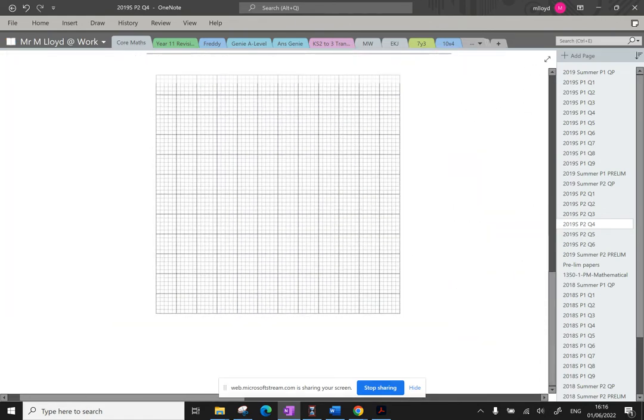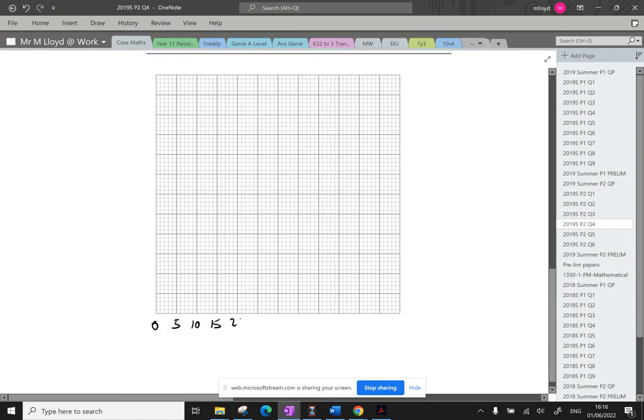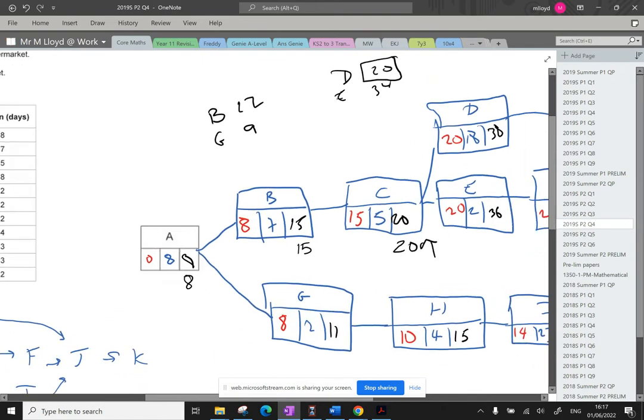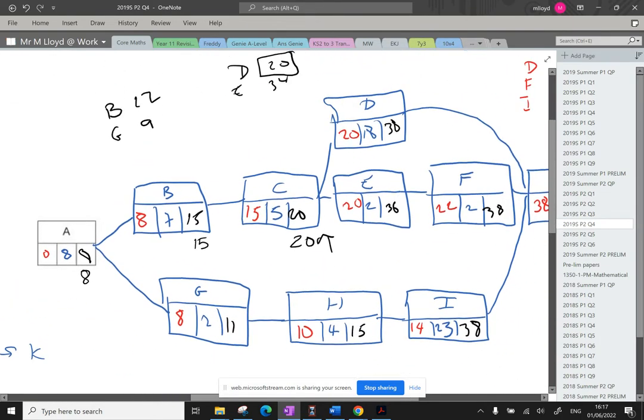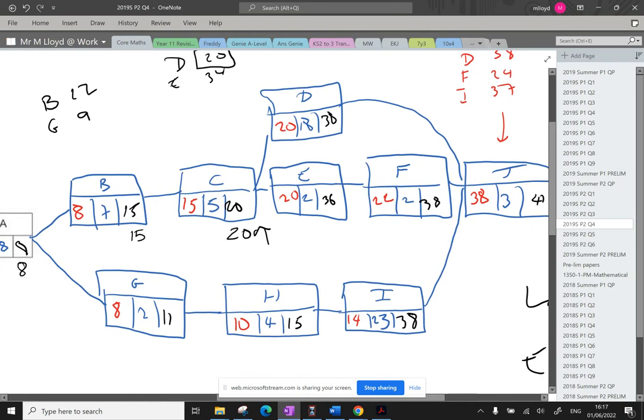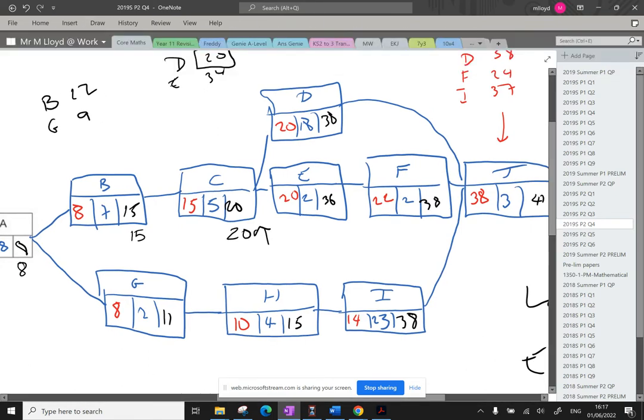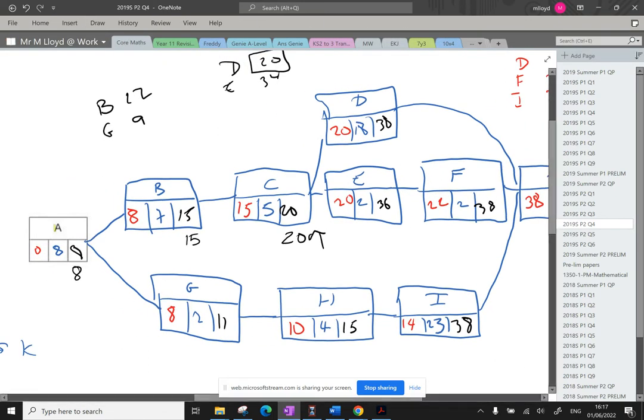So for this one, I'm going to do the Gantt chart. The cascade diagram I've seen is quite easy. You can hear the washing machine is bleeping. So we're going up with fives for this. 35, 40, 45, 50, 55, and then 60. The way I like to teach this is to get that critical path all the way along the bottom. So if we go across here, you can see the ones that have no float times are going to be the ones that have got where their late time take away the early time will equal nothing. So that's A, or the duration of the early time add to make the late time.